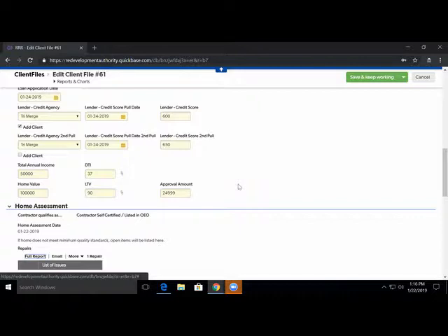program guidelines, the way that we kind of agreed, based on the ones that we all signed the agreements on the 13th of November, was that first the homeowner comes in, and if they met the program eligibility requirements, they would submit proof of income, proof of insurance, property taxes, and then they get a pre-qualification amount from the lender. The pre-qualification amount is good for 120 days, and then we decided that the PI goes into the house and does the home assessment, and the reason that we decided on that order was that we didn't want the PIs to be going in and coordinating with contractors and doing the home assessment if the borrower was not going to at least be pre-qualified for the loan.